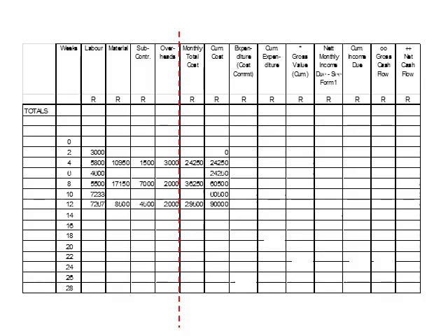A committed cost is a cost incurred on a project by means of a purchase order, also referred to as a contract to purchase, for which a business is obligated to pay after the delivery of a product or service. Expenditure, therefore, relates to the outflow or payment of money to acquire something. It is the payment made for a product or service delivered, relative to the obligations in a contract, and puts a commitment to pay into action.